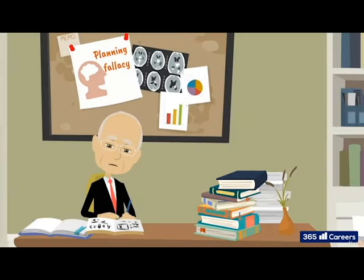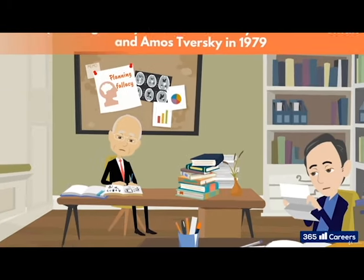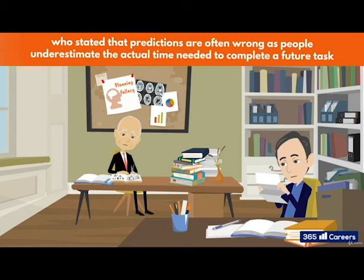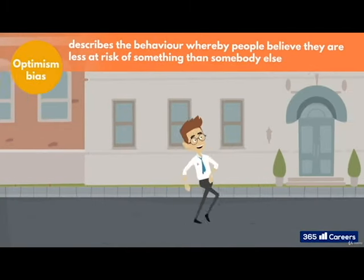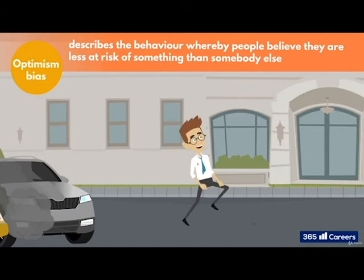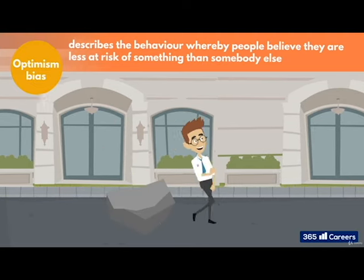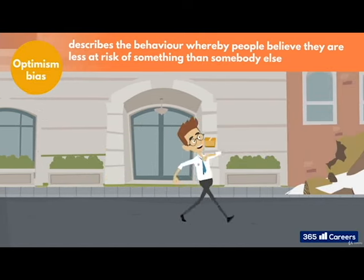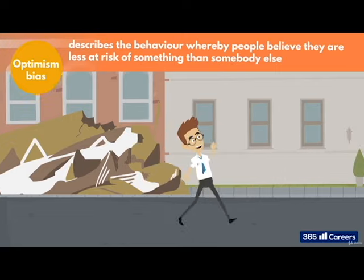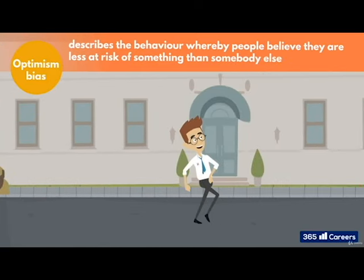The planning fallacy is a phenomenon in human behavior discovered by Daniel Kahneman and Amos Tversky in 1979, who stated that predictions are often wrong as people underestimate the actual time needed to complete a future task. They believe things will work out well due to the optimism bias. The optimism bias is a term used to describe the behavior whereby people believe they are less at risk of something than somebody else. Think of the age old, I never thought it would happen to me. This is an almost universal cognitive function. Therefore, the optimism bias is an understandable reason why people neglect to think of every worst-case scenario when planning.